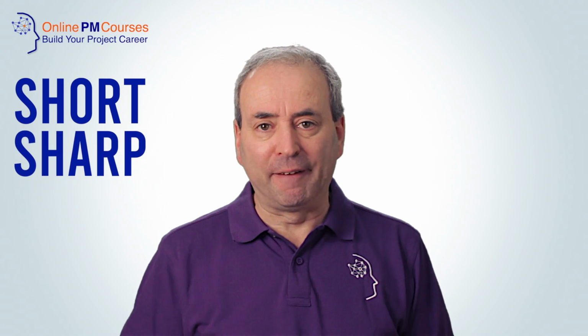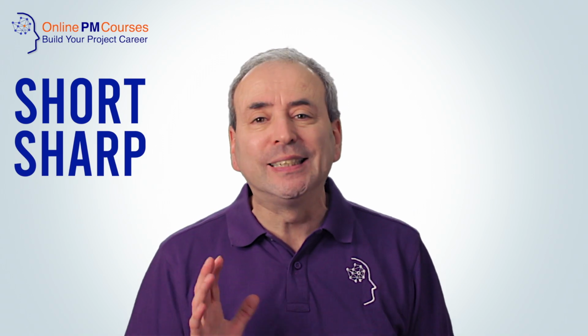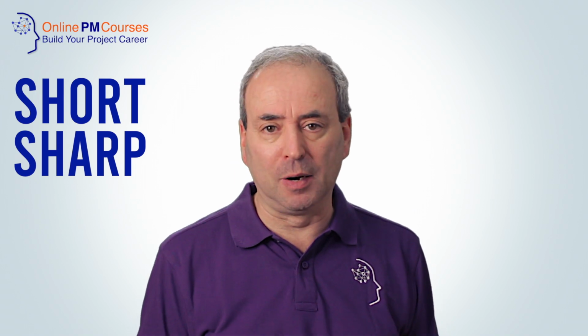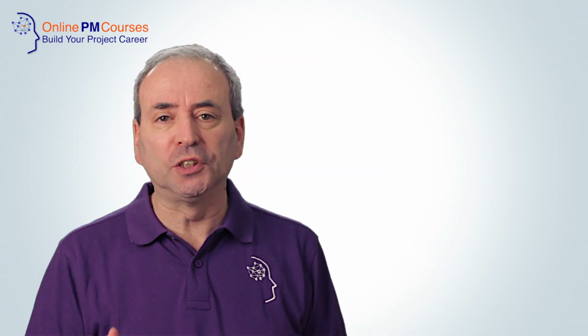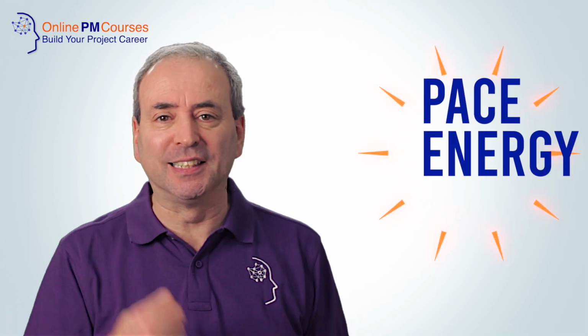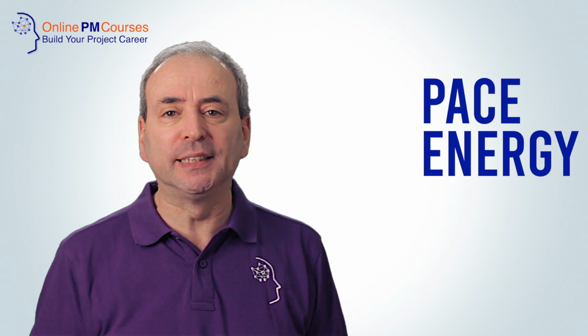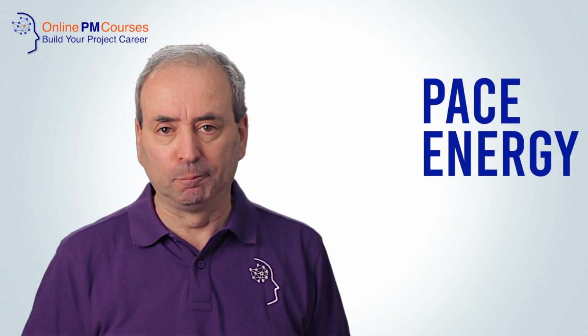Daily stand-up meetings are short. For a small Scrum team of no more than half a dozen or so people, it's typically 15 minutes. But the essence is on keeping it short and sharp. And 15 minutes is good, and we stand up to stop us relaxing and taking our time over it. What's important is pace and energy, and making sure everyone concentrates throughout the short meeting and contributes fully.